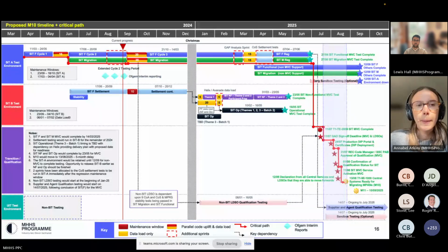Yeah, I think that's good in terms of if people can go faster, it de-risks the whole plan for a lot of other people. But I think it's dangerous to assume that the whole of the qualification timescales can move forwards. If we do identify that SIP participants are looking as though they could bring the thing forwards, then I guess it needs the code bodies to be involved to see if they could support earlier dates for some of the qualification participants. So yeah, absolutely, Lee. There's a number of elements there that we would need to consider and work through if that eventuality came around. And I think also it wouldn't necessarily be a blanket, right, we're bringing M14 forwards, for example. If there are participants that are ready to go early and the programme can support, which we'd endeavour to do, and the code bodies are available to support them, yeah, we'd look to support that. Yeah, definitely should be listed as an opportunity, shouldn't it? Yeah.